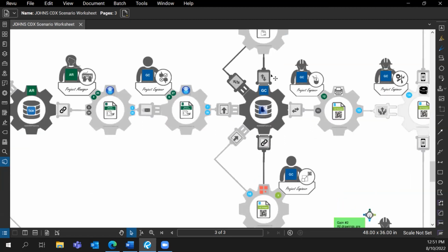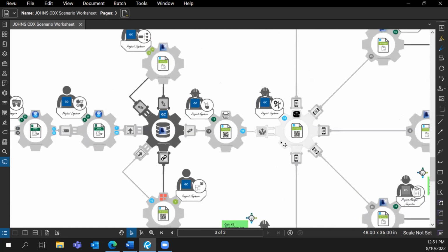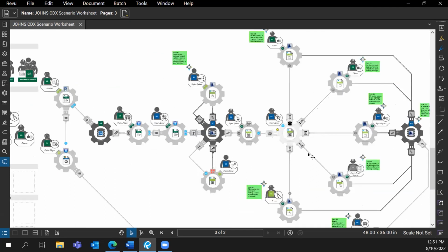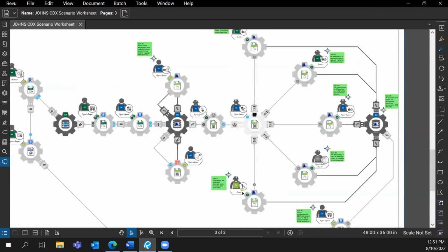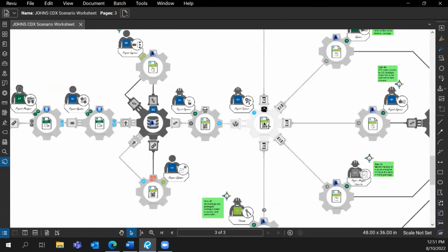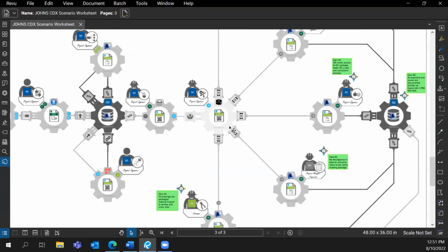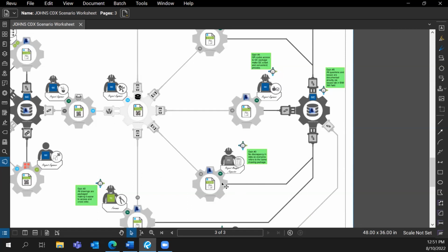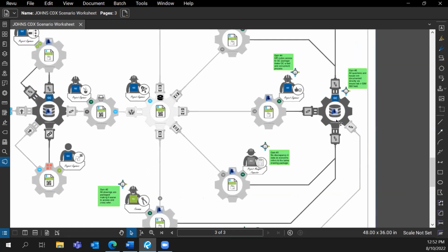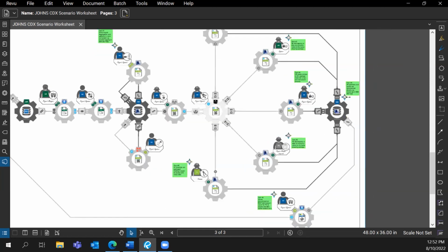Then similarly, for the packages and the tags, you can create a QR code link. You create a QR code and you paste it on the site. Once it's pasted on the site, every single trade partner and stakeholder can use this QR code to access drawings on the site. And once that is done, if there are any communications that they need to make, there is an issues tab in BIM 360 Field that is also linked with this QR code. So basically they can directly type their queries or questions into that issues tab, and after that, it is automatically updated in this.